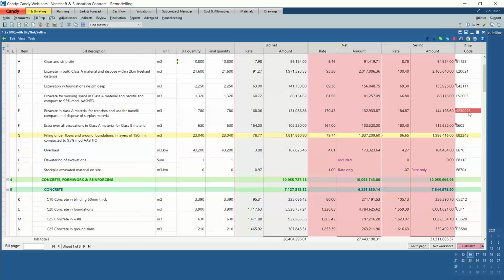And as I've mentioned, a macro also starts with a number between 1 and 9, and this represents the hierarchical level where 9 is the most junior level. And then the second character represents the trade, or the valid trade character. And the balance of the code is free format, and the complete code must not exceed 8 characters wide, right? So when you create a macro, you first start by creating a price code in order to get a macro worksheet.